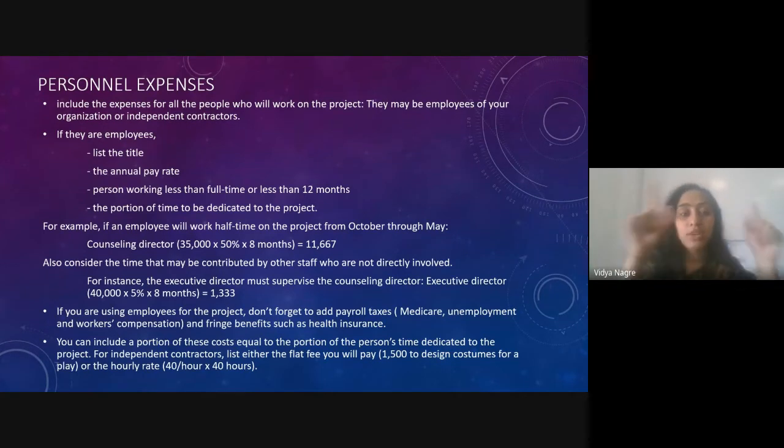Before you make your overall expenses or budget, please make sure that you have added each and everything. If you submit the proposal and it gets granted, and then you remember a major cost, something major that you want to bear a cost for, you cannot go back and ask the funder for that. Your portion is gone. Then whatever you have received, you have to manage with it, or you have to pay from your own pocket. So you have to make sure that you make a list of each and everything.